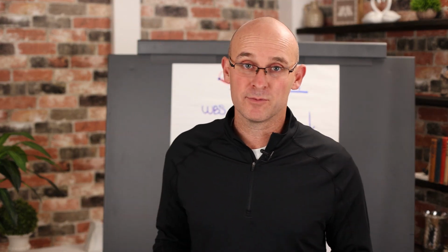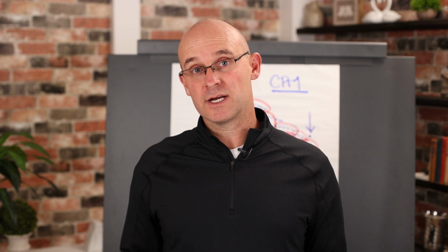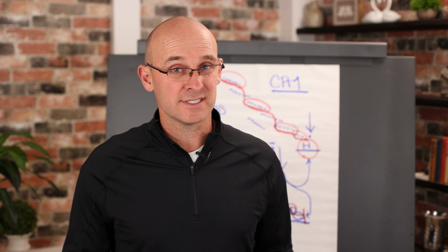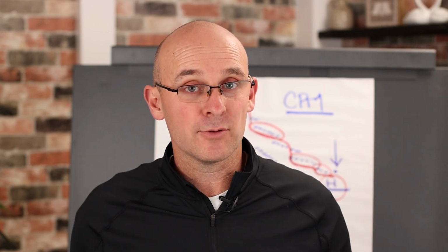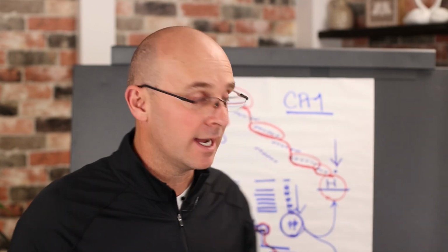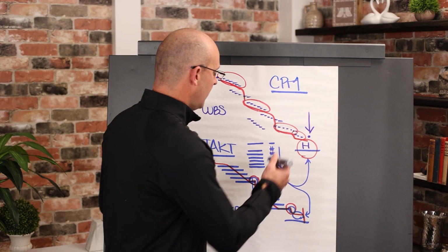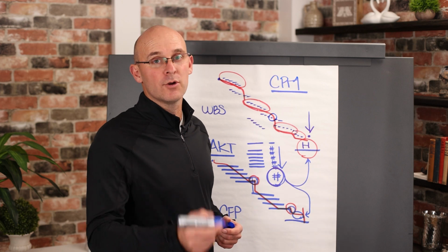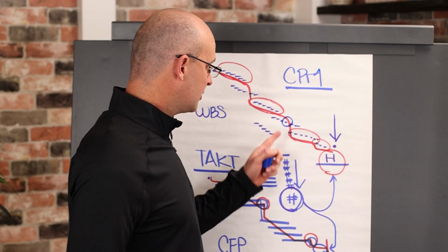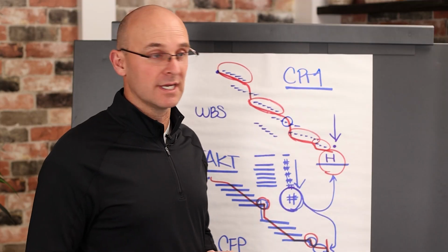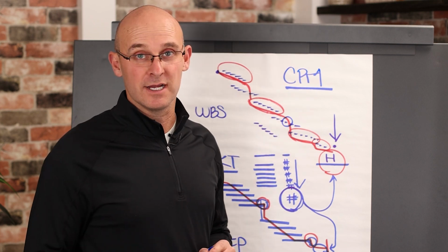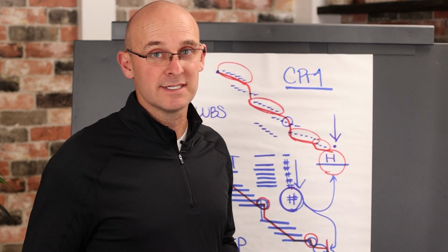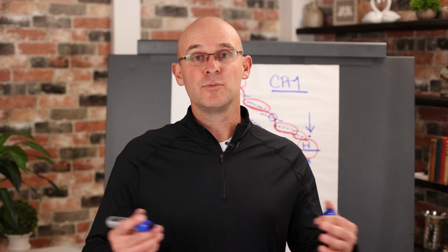Second thing I want to warn everybody about is that if you're in a contract where you can't get a time extension or you can't get financial compensation for a change based on the critical path, you're in trouble. Here's what happens. The owner will say, oh, I delayed you over here. Okay, is that on the critical path? No, I don't owe you any time or money. Well, this could end up impacting the overall schedule. This could have a chain reaction. This could be a problem. So that's not a real argument. Whether or not it's in contracts or not, that's a moot point.